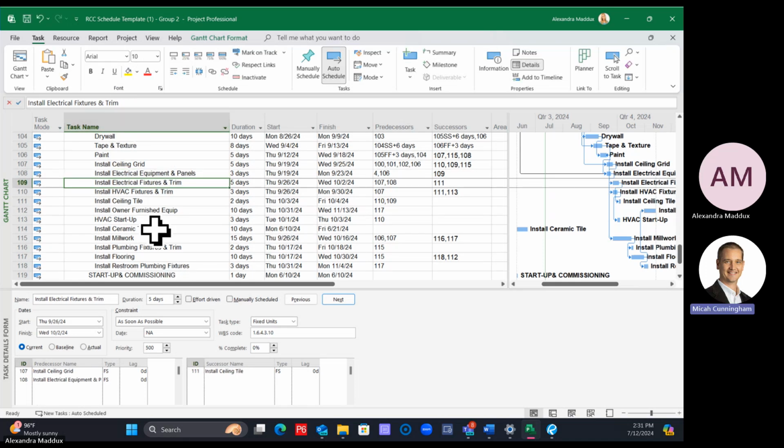Will it throw things off when you put it in half days, like 7.5? It'll make things start and finish on the same day. So it'll make something finish at noon and the next activity start at noon. So it just reads like a misconception of that.